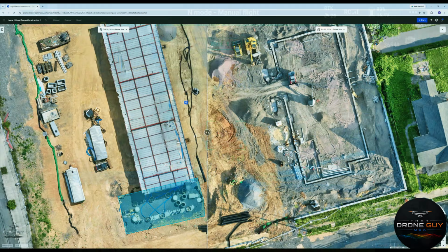After each site visit, the imagery, observations, and other information collected are processed into a comprehensive digital project record. Deliverables include a high-resolution orthomosaic, a detailed 3D model, interactive panoramic imagery, and comprehensive field observations with documented notes. Together, these deliverables create a time-based record that allows you to review the project exactly as it existed at any point during the construction process.